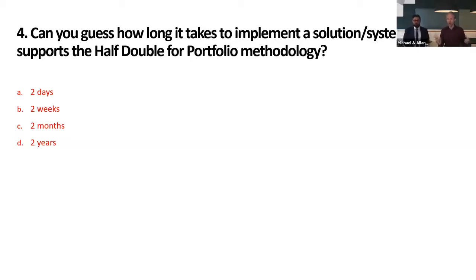You have a project and you can chop it up into 4 bits of impact. The 2 first bits can be executed in the first 3 months. So you execute those 2 bits, and then the portfolio committee says, okay, we need to put in another project for the next 3 months. So now we will put the 2 bits that are still lacking on hold for a while. And after 3 months, they will execute the last 2 bits.